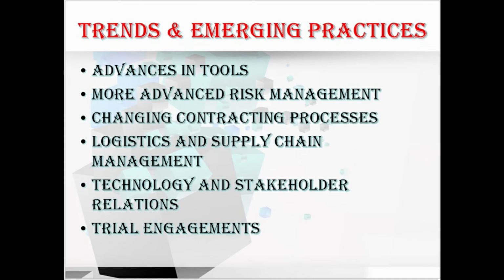Moving to logistics and supply chain management. Here, because so many large engineering, construction and infrastructure projects are done through multiple international contractors, the management of the flow of materials becomes very critical to successful completion. That is, for long lead items, both the manufacture of the items and their transportation to the project site become schedule drivers nowadays. Okay, hope you understood about this logistics and supply chain management.